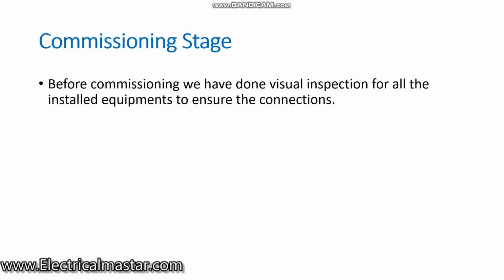I have to visually check all the connections and installation, that the equipment is properly installed, the connections are properly tightened, all the cables are properly tightened and the cables are properly dressed in the DBs. I have to verify all the connections as per the drawings. Everything is perfect. Then I have to do the loop test for the individual connections, so continuity and loop tests, and also the earth test to check whether the earthing is working properly. These are the things that will ensure our installation is perfectly done.